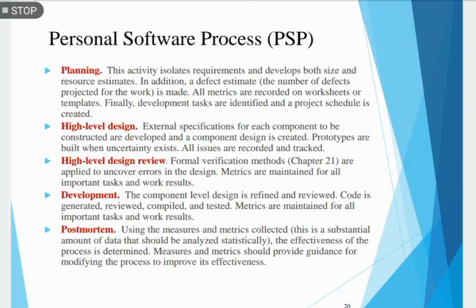The first framework activity is planning. This activity isolates requirements, and based on these the developer makes both size and resource estimates. In addition, a defect estimate — the number of defects projected for the work — is made. All metrics are recorded on worksheets or templates. Finally, development tasks are identified and a project schedule is created.